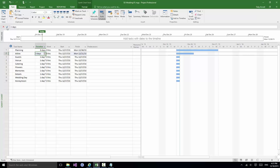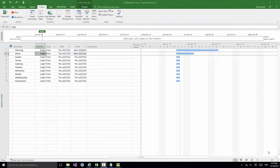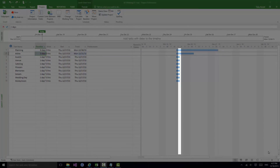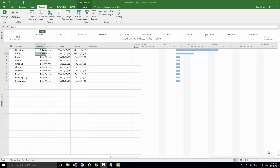I don't have to use the rollers — I can click in the Attire duration field and type directly, either watching the field or the Entry bar. For example, typing three days and confirming it. As you adjust the duration, the bar in the Gantt chart extends accordingly. Note that when I talk about an eight-day task, I mean eight working days — weekends are not included with the current calendar. Also look carefully at the right-hand end of one-day estimated bars: the vertical line there is the today line, showing the current date on the chart.